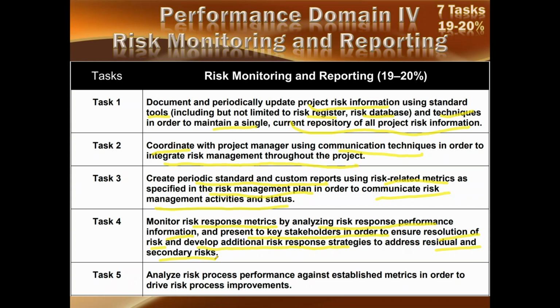Moreover, there are secondary risks, which are risks hidden behind the original risk. Once this risk occurs, only then the secondary risks become visible. They are not residual risks. Secondary risk is not residual risk. This is a full-fledged risk, but it cannot be seen before the risk in front vanishes.